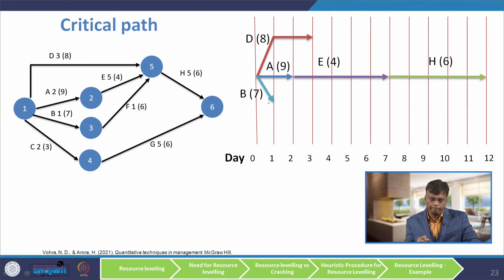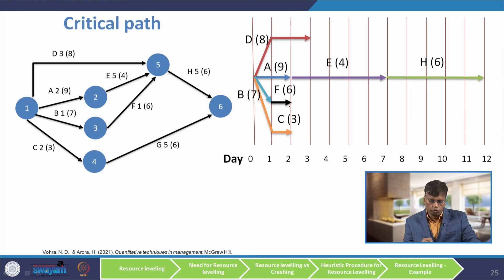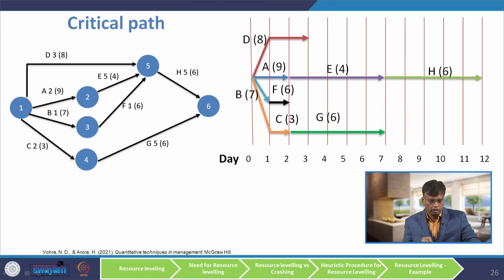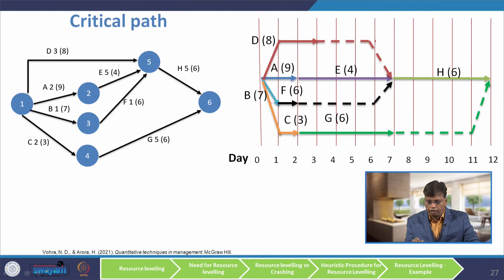Activity C has a duration of 2 days and a manpower requirement of 3. Activity G has a duration of 5 days and a manpower requirement of 6. Activities A, E, and H are the critical activities. Activity D finishes with E — that is why a dotted line is drawn. Activity B has a duration of 1 day, followed by activity F, which also finishes with activity E, hence dotted lines. Similarly, activity C is followed by activity G, which finishes with activity H — that is why the dotted line is drawn. The maximum duration of 12 is derived from the critical path.